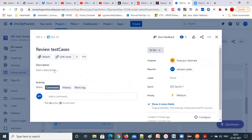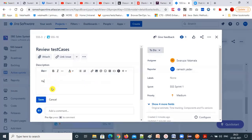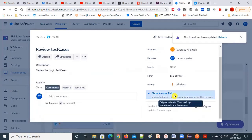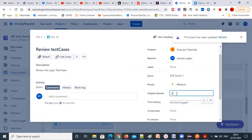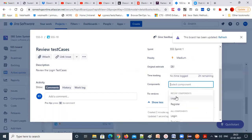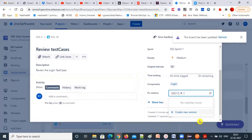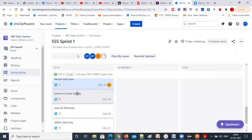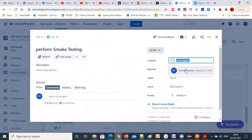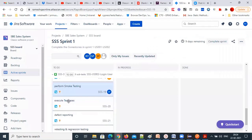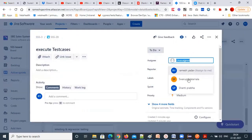You prepare the test case — you should not review your own. So 'review the login test case' is a separate task. Give an estimation of two hours for the review. The component is 'login component.' Fixed version should be in the same version. Performance testing is done by Santy — she is the owner. Execute test cases also — we will assign all these things similarly.